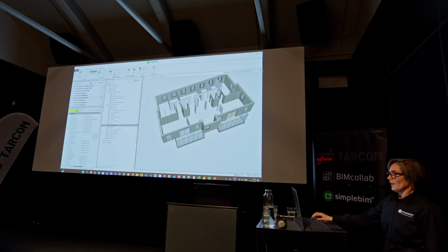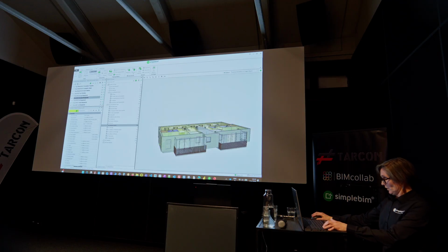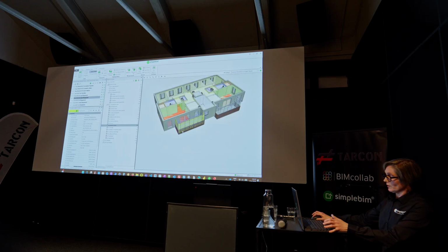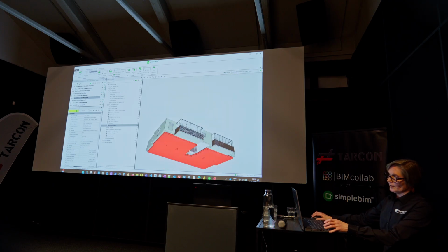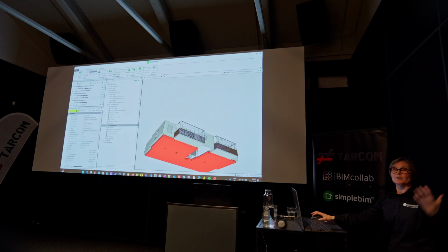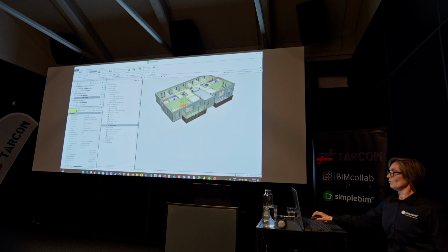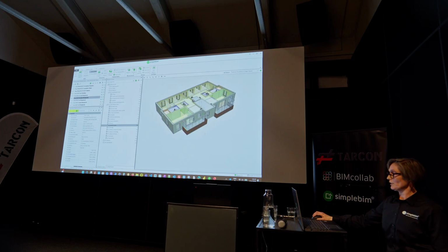And then schedule management, maybe on a site, what normally people would like to have, they would like to calculate the quantities by location. And again, I have just created the steps with standard rules, which objects or building parts will always be split. But of course, the locations are project specific, that's for sure.